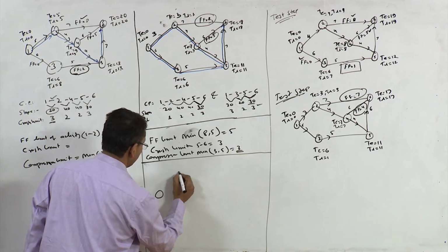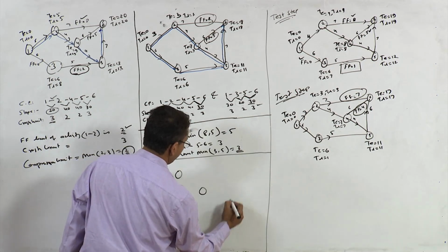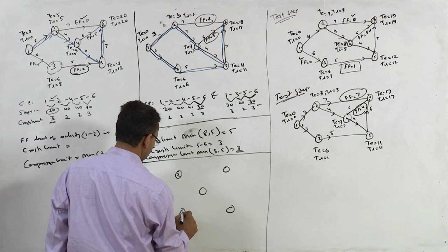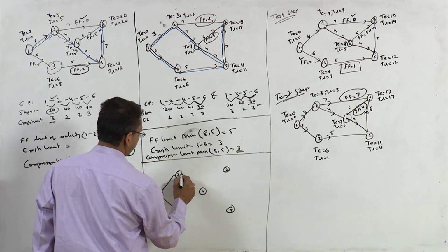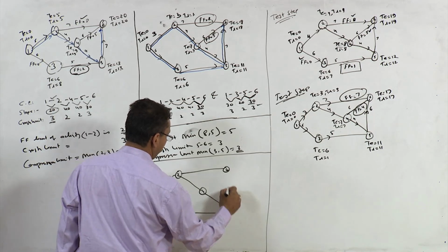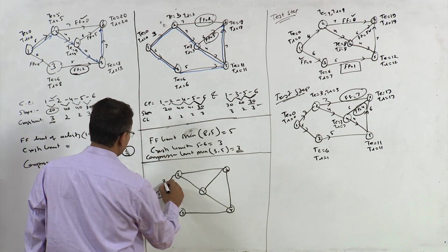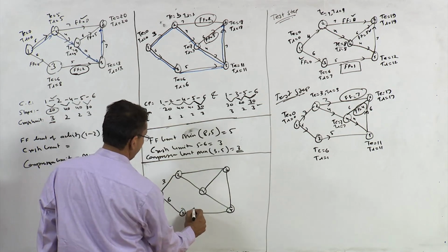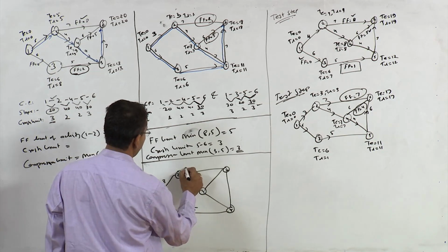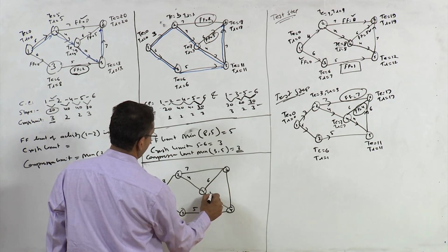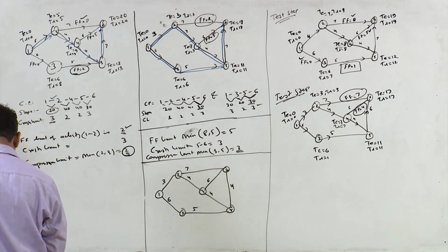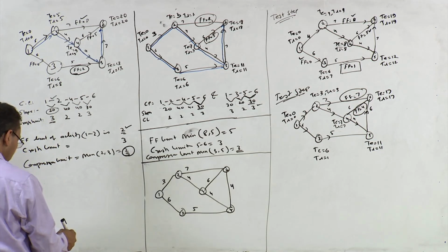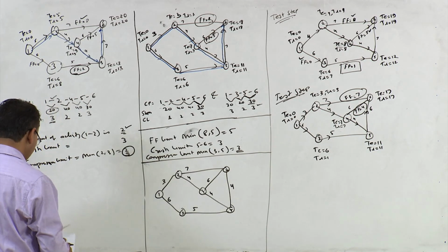So let me write it here, 1, 2, 3, 4, 5 and 6. So this is 3, this is 6, this is 5, this is 7, this is 4, this is 6, this is 4, and this would become 4, right? So we have decided to reduce it by up to 4 days, because the crash limit is